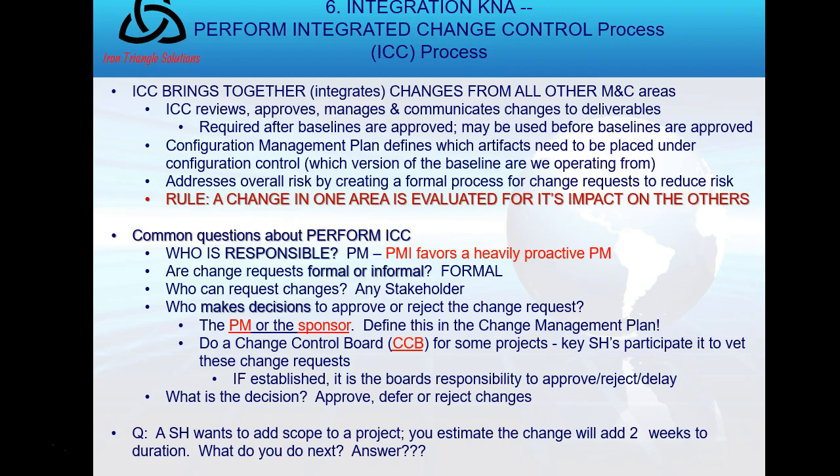We perform ICC. It's the process of reviewing change requests, of approving them, of managing them once they've been approved, so that the changes get incorporated into the deliverables we're trying to make. So this becomes an integrated approach for addressing overall project risk throughout the project.